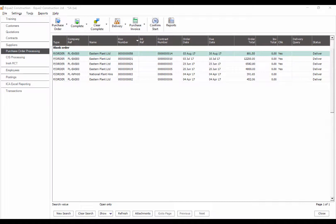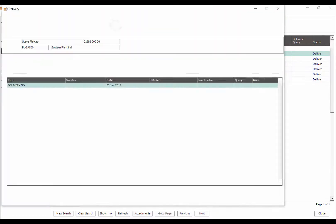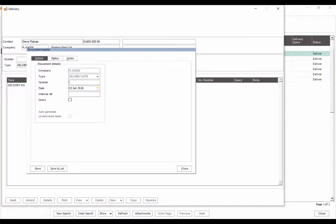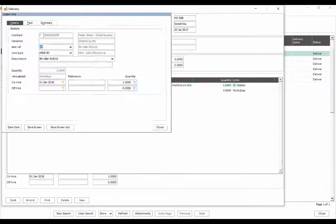Once plant items have been received, the delivery function can be used to record the actual on hire and off hire dates of each plant item.